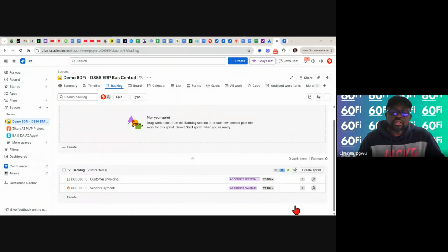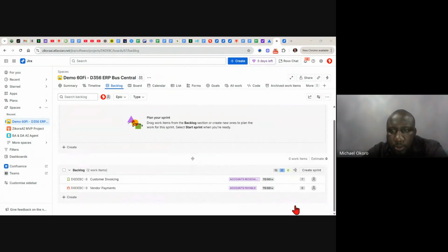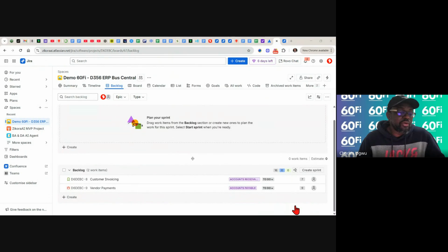Well, in agile project management, you do not assign work to anybody. They pick work themselves. So you don't assign work like this. You didn't see me as a Scrum Master assigning work to anybody. They are picking what they can do. So they are a self-managed team. Nobody manages them. They do what they want, as long as they are moving. But you don't assign work to them.